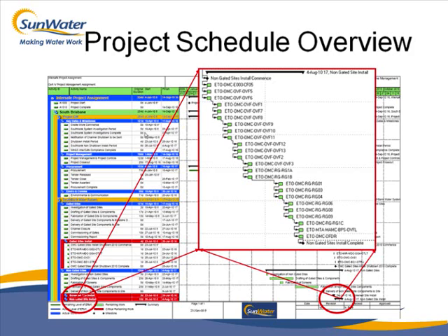We did the assessment that these activities here, which are installing of gate components such as walkways, handrails, non-actual gates being put into the channels. We assessed that a team of 2 could do at least 3 to 4 per day of these sites. So we've just basically made them start to start, so when one starts, the other one can start. So basically these are one-day activities, and we're hoping that all 3 of them will be done in that one day. They'll come back the next day and move on to the next 3.